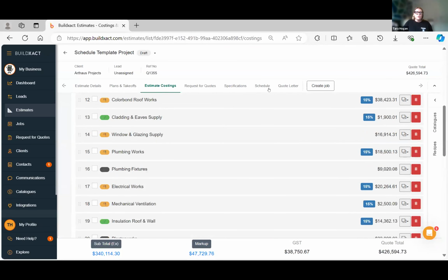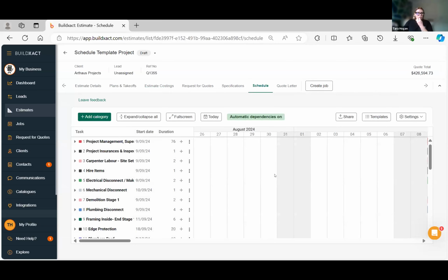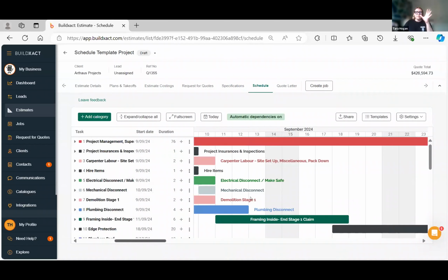Sorry, guys. So going back to the schedule and setting out your stage claims, that links back to how we are then controlling our costings, because when we're setting the estimate to then build our schedule, we need to track how we then set a stage claim. And setting the stage claims and also your provisional sums and your prime costs are really important to feeding over how we operate in our zero capacity, because all of those items, your cost centers, are what are known as your chart of accounts and how they'll track where you're putting money in a project. And so we align that from our estimate all the way over to how we set our schedule,